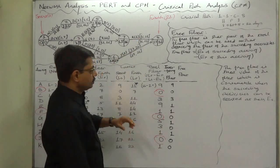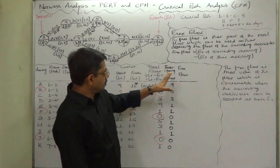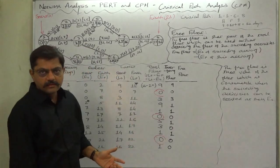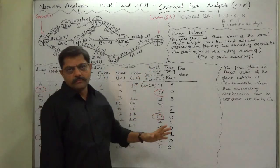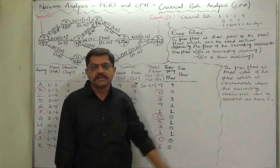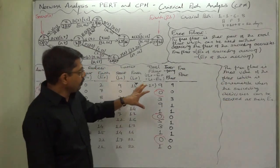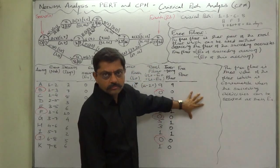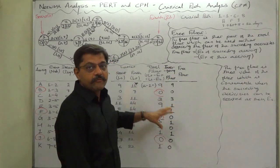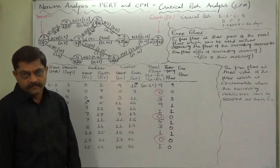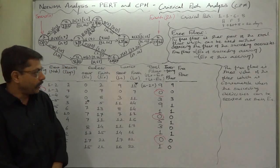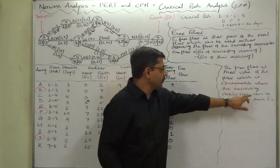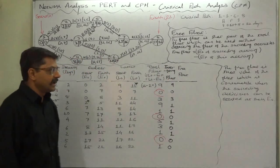In the previous lecture, while understanding the interfering float, we also discussed that using the float may affect the floats of other succeeding activities of the project. So which part of total float is available to consume without affecting the floats of succeeding activities? The free float is that value of the float which is consumable when succeeding activities can be started at their earliest start times.